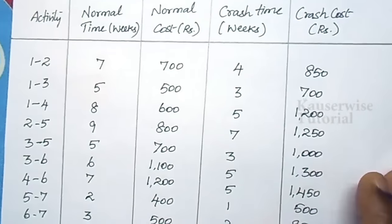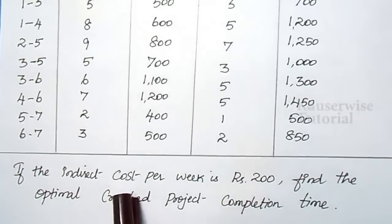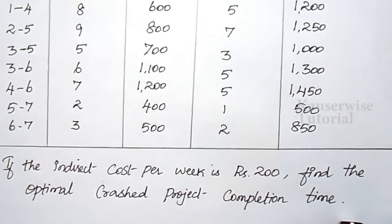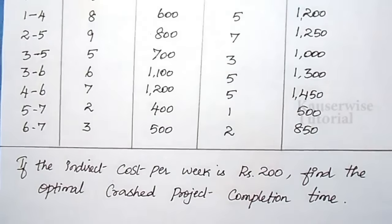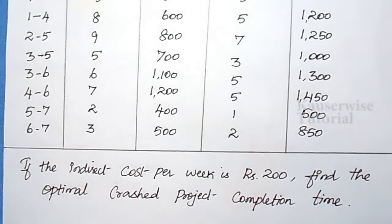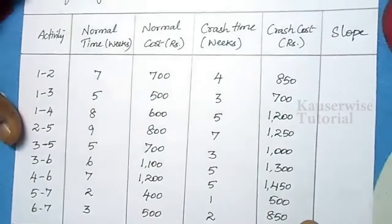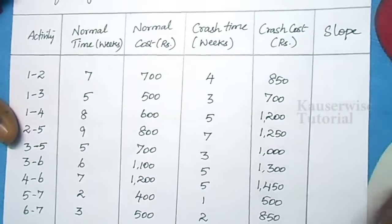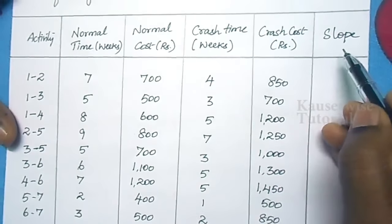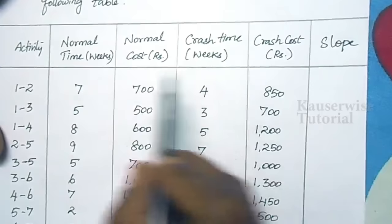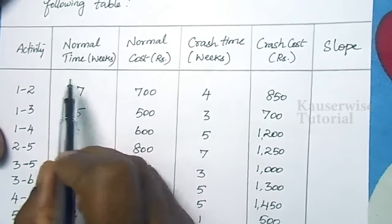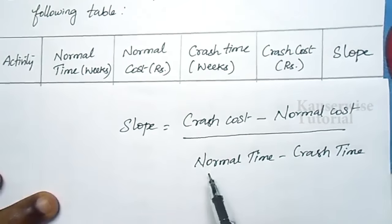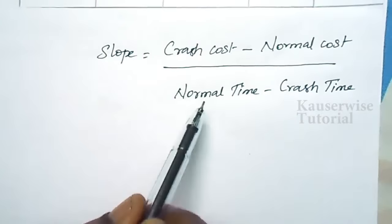If the indirect cost per week is 200 rupees, find the optimal crashed project completion time. Before drawing the network diagram, you need to find the slope for all activities. The formula is: slope = (crash cost minus normal cost) divided by (normal time minus crash time).